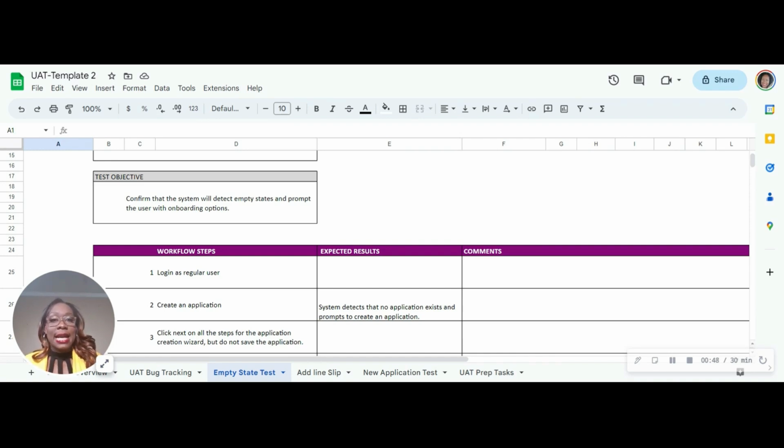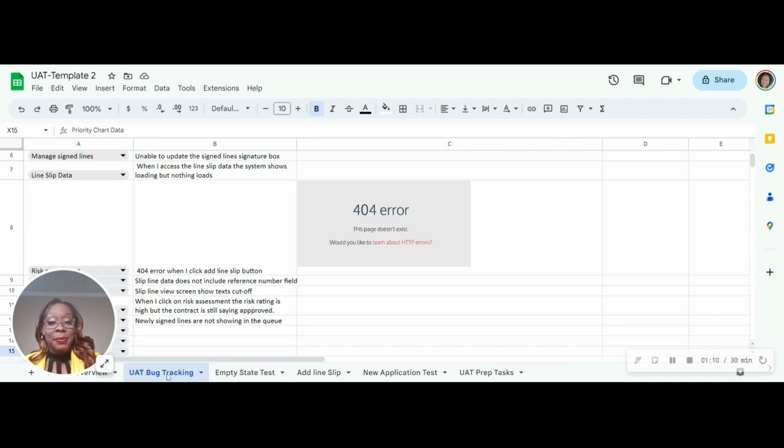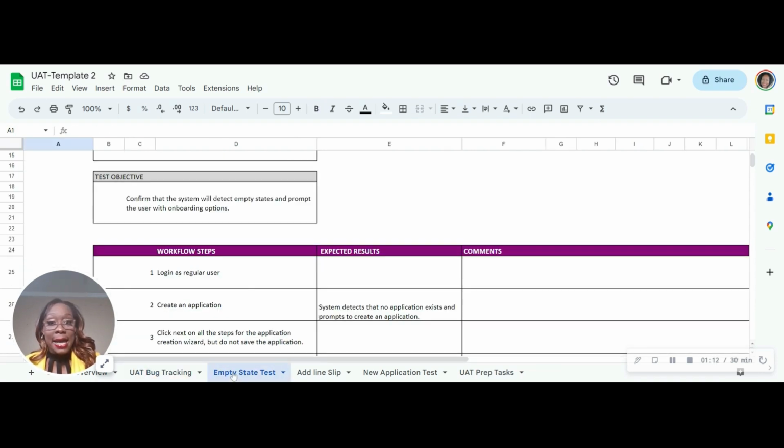All right. So your testers will go through this, and then when they find a bug or they think it's a bug, if they're virtual, they'll come off mute because you'll be running a meeting that they'll be in. They'll come off mute and they'll highlight what they've found, and you'll confirm it's a bug, and then they'll go and log it. And the good thing about this when you're doing it virtual is that because it's one meeting that everybody's in and they're all testing at the same time, then if somebody else has the same bug, they don't go and log it again because they don't want to have duplicate bugs, right?